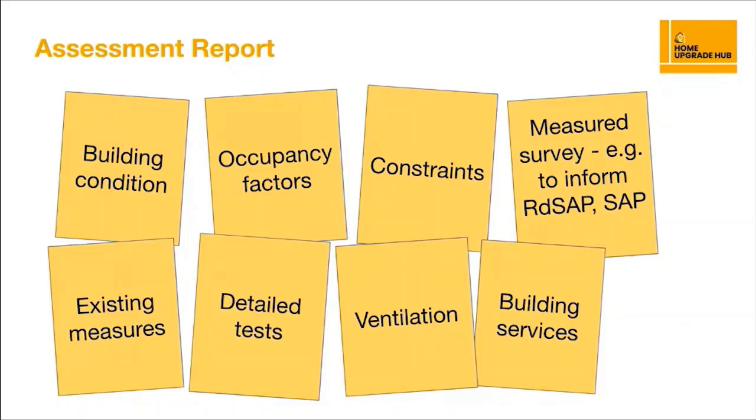Now, in terms of how you manage this on large projects, it may be that one assessment report could be used to cover a group of similar properties, providing that you identify where there is variation within those. But I can guarantee that even if you think you have a bunch of identical properties in terms of constructions, they probably aren't. So even if you're able to bundle things under one report, it doesn't mean you can get away without doing individual surveys or visits.